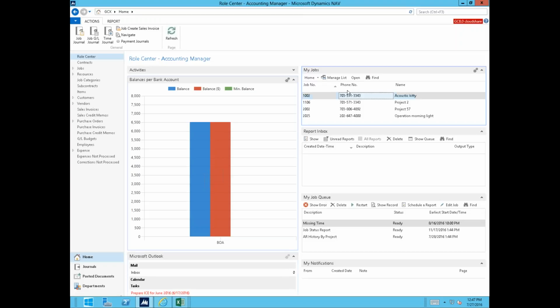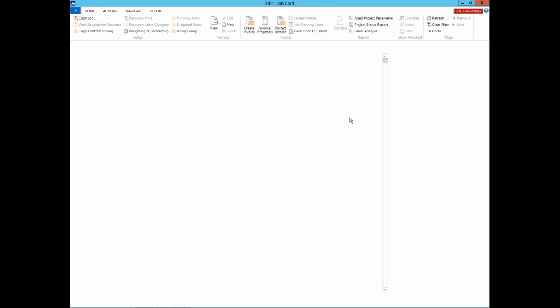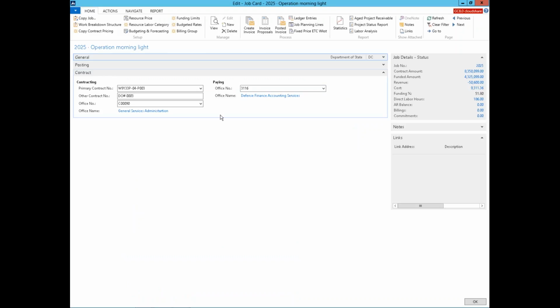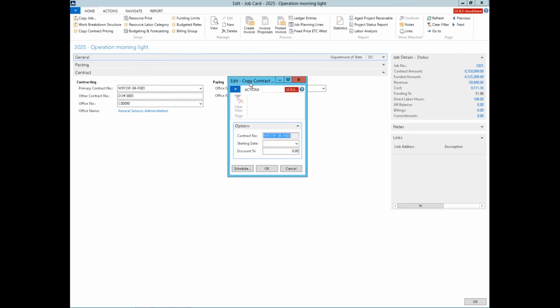I'm going to go to a T&M to talk a little bit about how T&Ms are a little bit different. So I won't go through any of the other setups, but I do want to touch on, with a T&M, I'm not billing it based on cost. I'm billing it based on predefined labor rates. We mentioned earlier this idea that if I had a contract associated with it, so I've got this, in this case it's a GSA contract, this W-9 one, I could actually take all of my GSA pricing and copy it into this particular job.